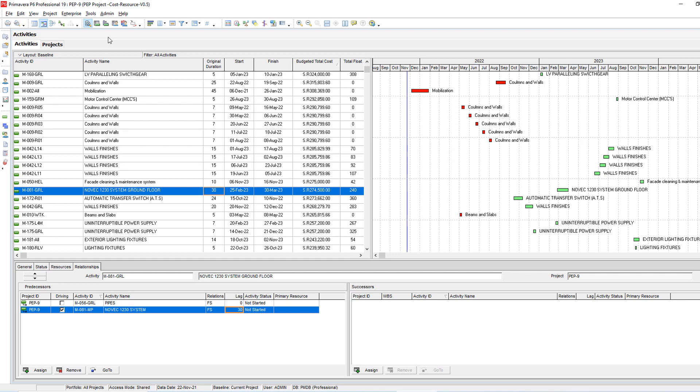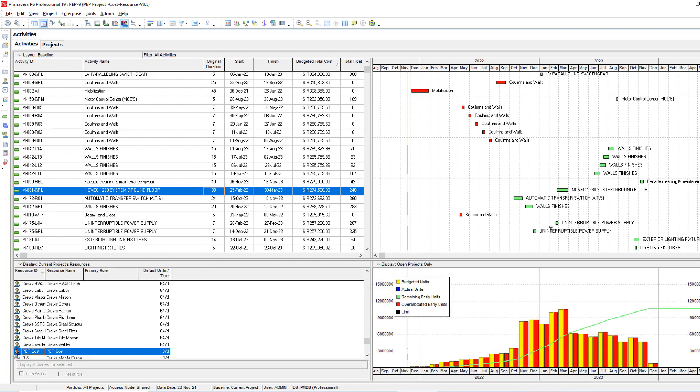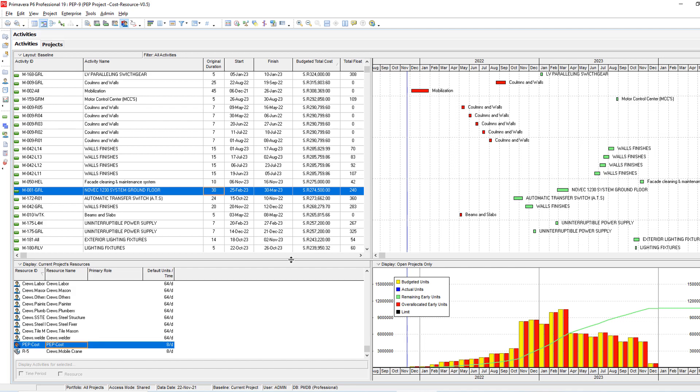Now let's see how it looks like. You can move on and increase the duration, move the activities until you find the proper leveling you are looking for. This is how we can do leveling in the cost cash flow. This same method is also applicable for the resources. I hope you will find this lesson useful. See you in the next one.